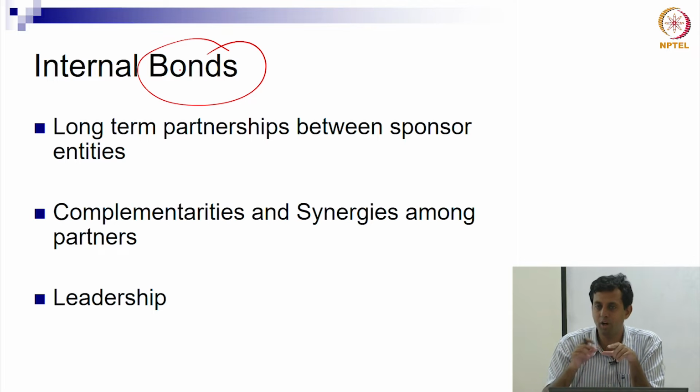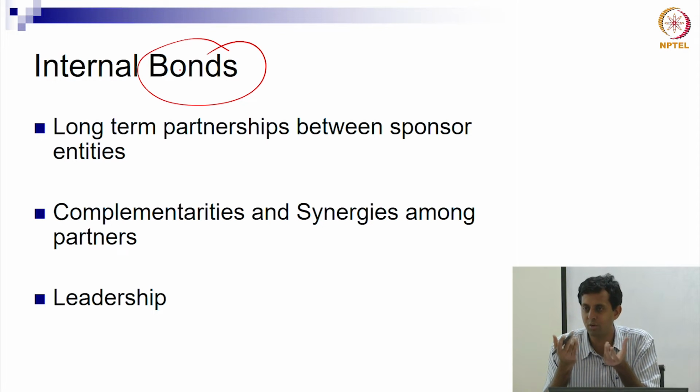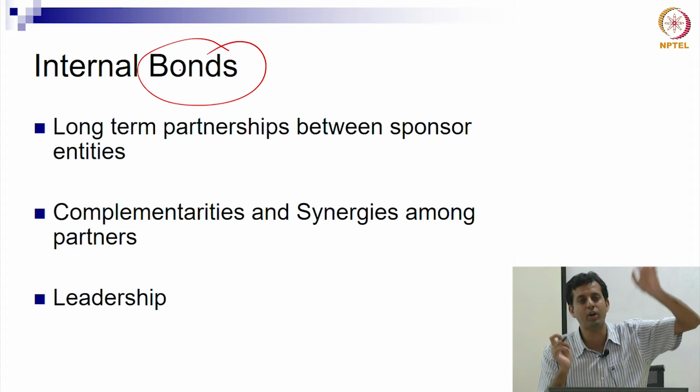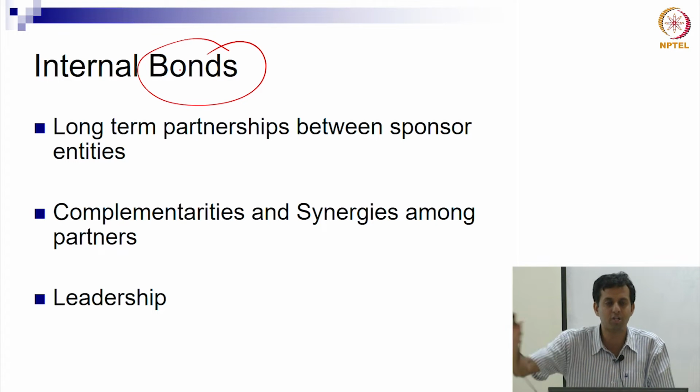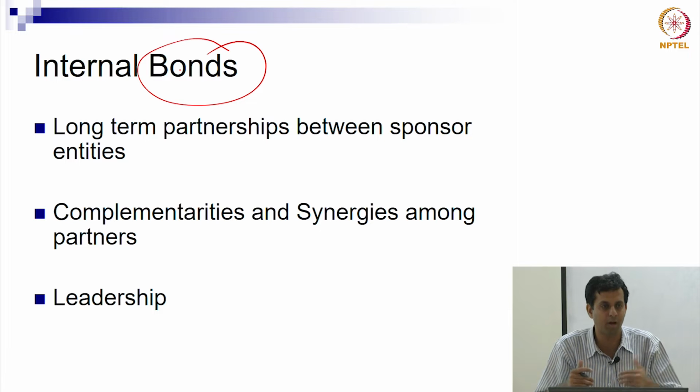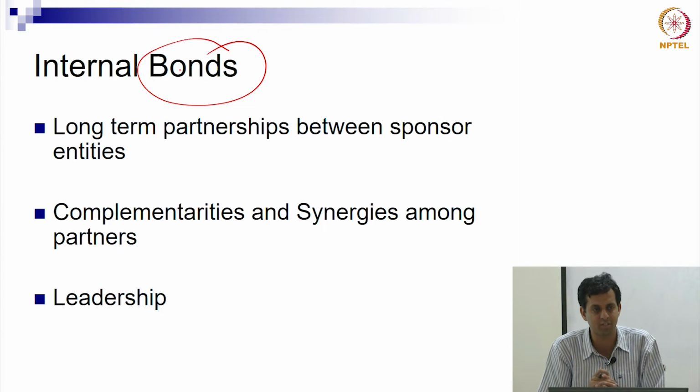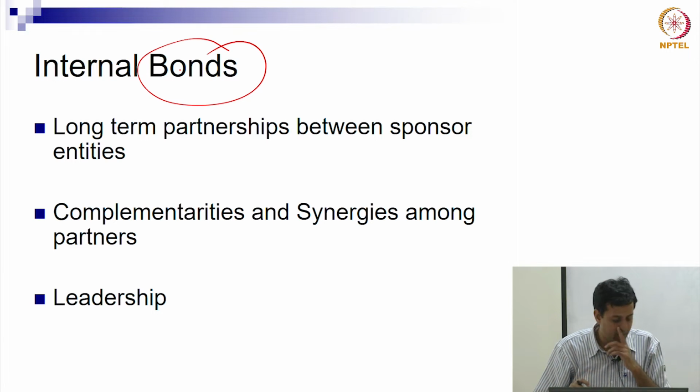So again, when we talked about the Delhi airport case, we talked about this NFC, that facilitation committee, which the government set up, which essentially was to bring everybody to one particular location and build those bonds so that all of these decisions got taken faster. Otherwise, the electricity department will not give you permission to dig somewhere. The roads department will not give you permission to dig somewhere. So you need to build these bonds where we say, yes, it's going to disrupt your services, but here's what we want to do.